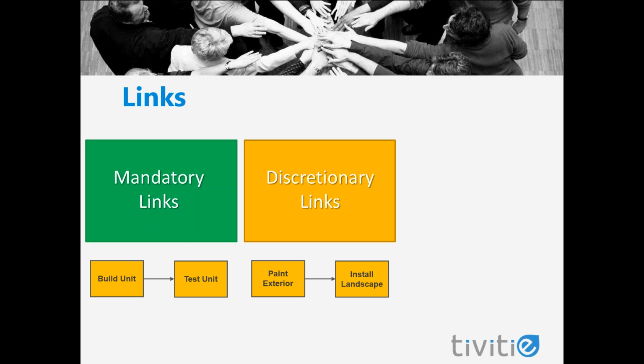Discretionary links need to be well documented because there may be reasons to revisit and change them if schedule challenges occur. For example, if my house starts running late, I may need to find a way to work those two tasks in parallel.